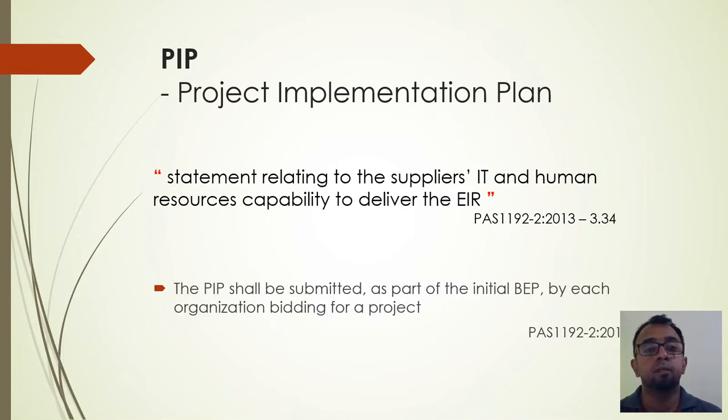The PIP shall be submitted as part of the initial BIM execution plan by each organization bidding for a project. That is also given there. So everybody who is bidding for the project will be submitting a PIP as a part of the BEP. A lot of abbreviations coming on. Right, so be familiar with these things.